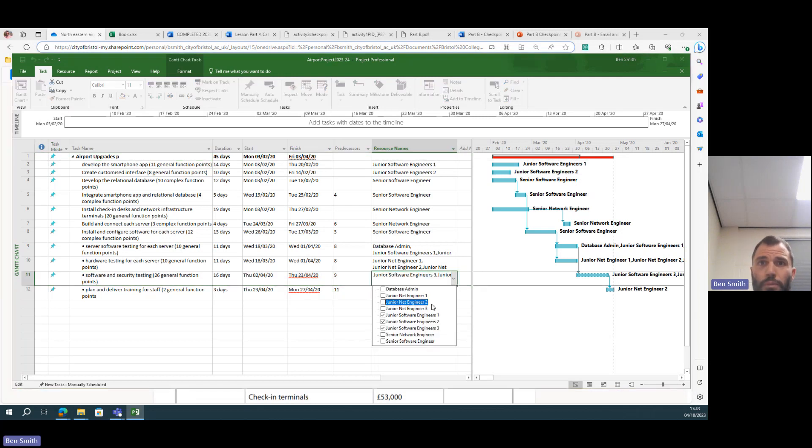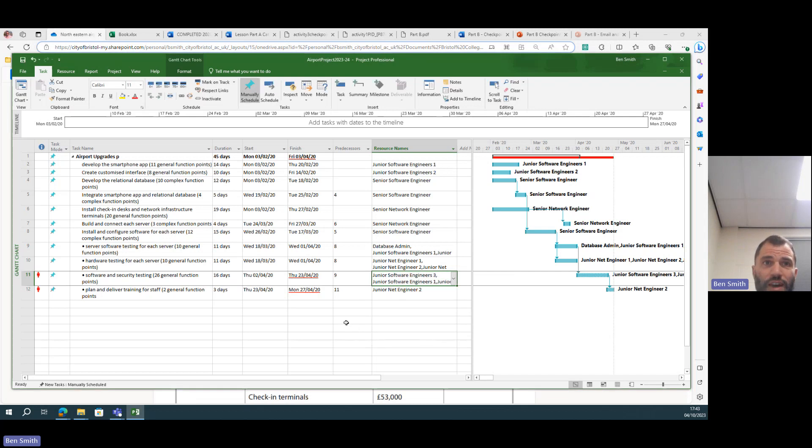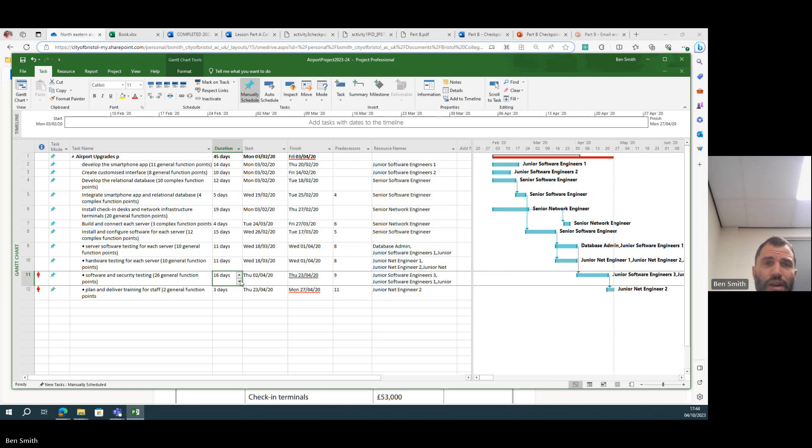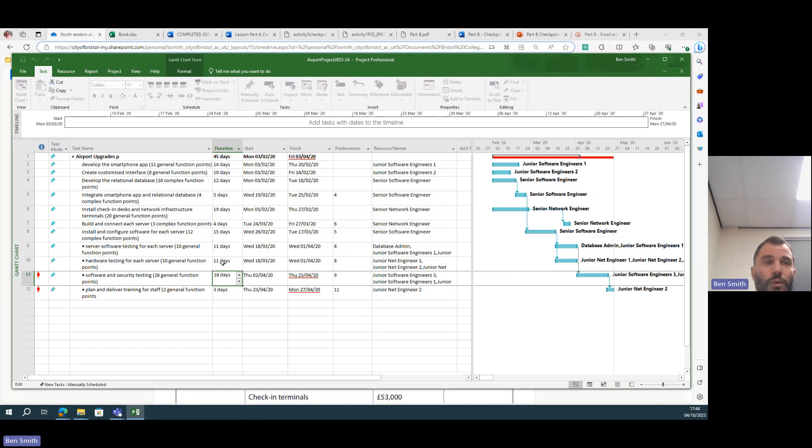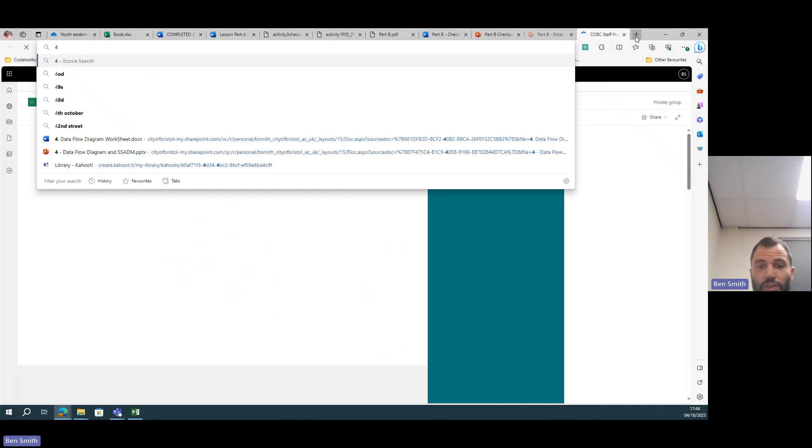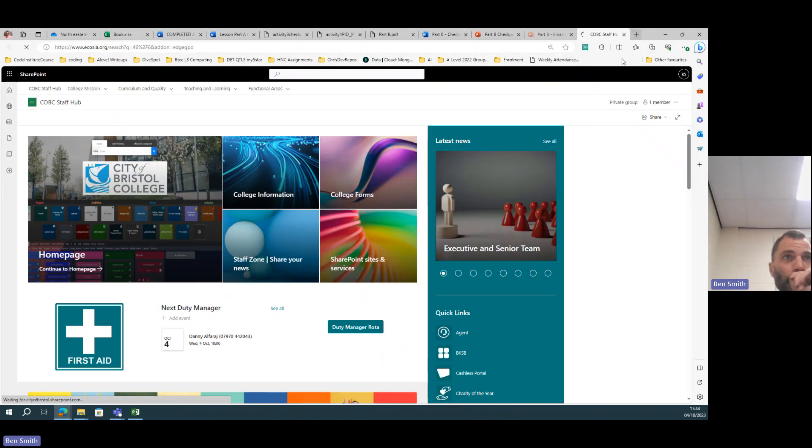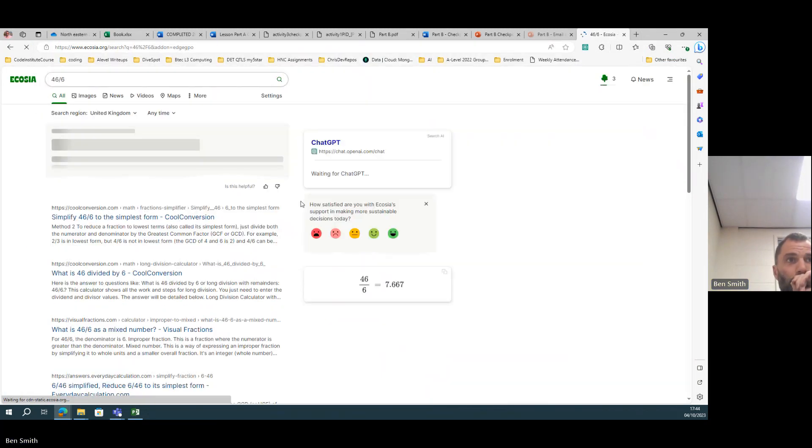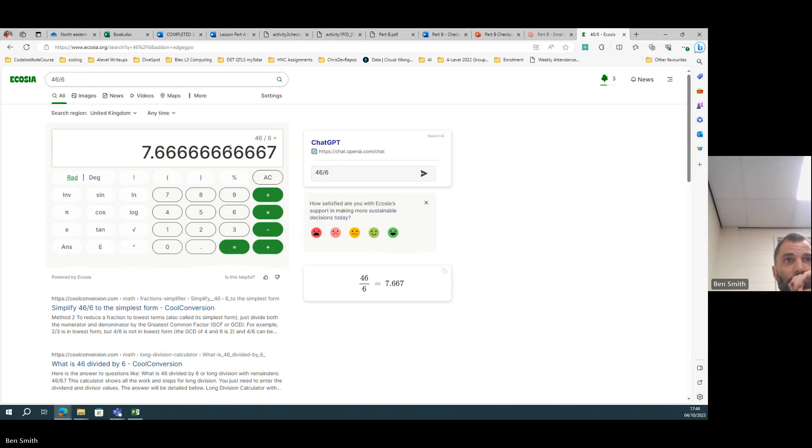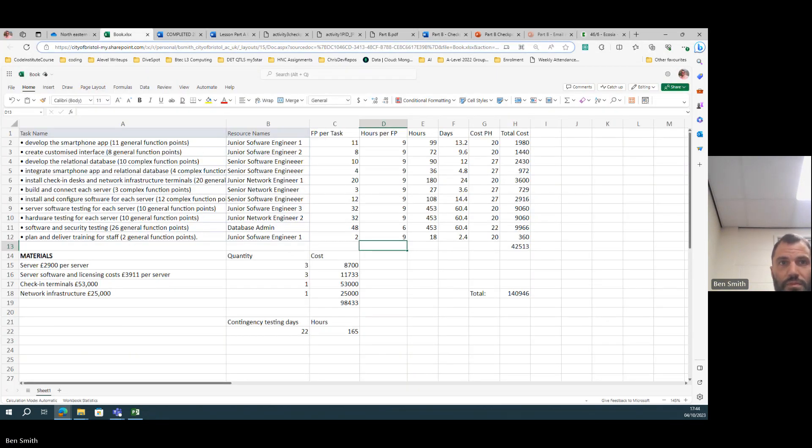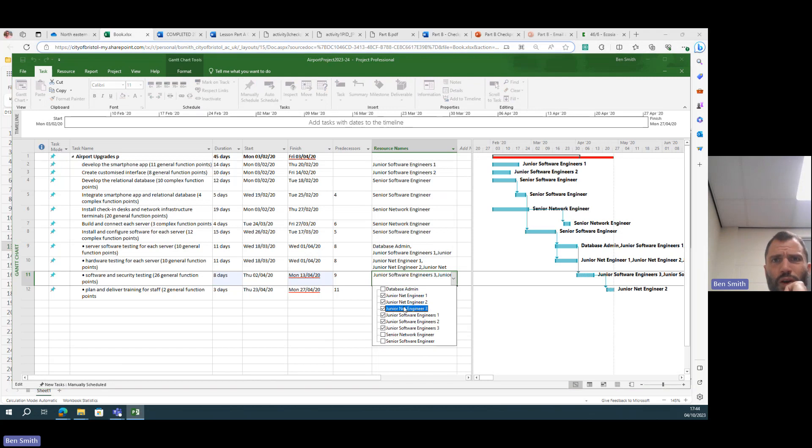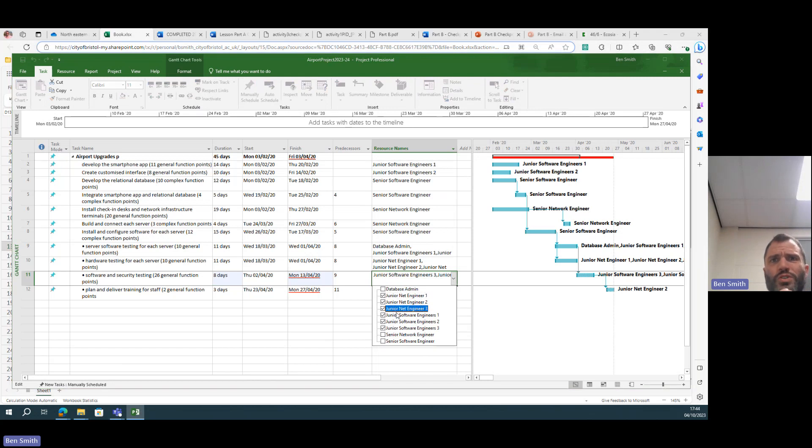Maybe we can put some network engineers onto it as well. Three more network engineers, then we could divide that by three. So 16 divided by—well, the original one was 48 wasn't it—so now we've got six people on it. So 48 divided by six is eight.